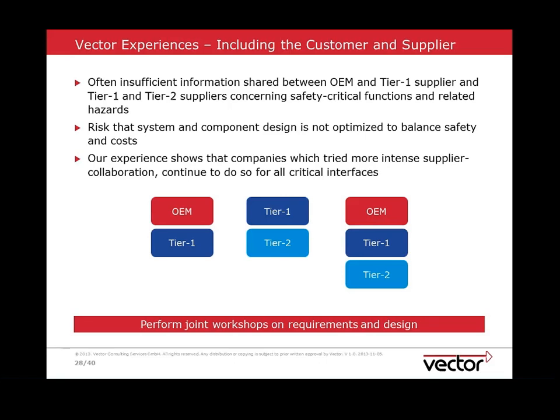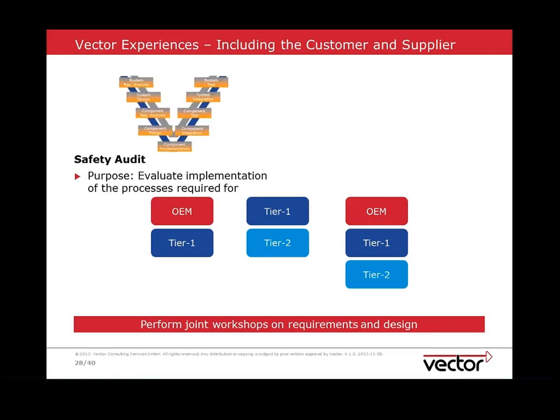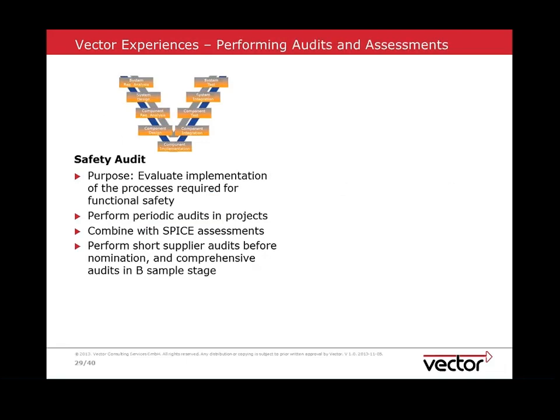But that also means that the different parties should share the same background and not just get a set of very specific functional requirements, but also what is the reasoning behind these safety requirements. So we recommend performing joint workshops, specifically in the early phases, on requirements and on design, in order to come to a mutual understanding about a safety strategy.